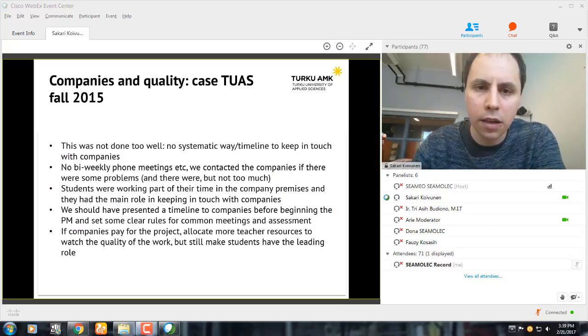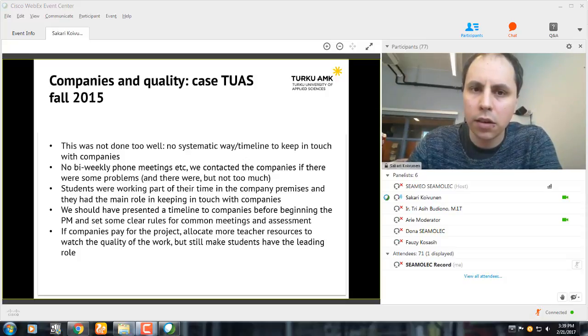Again, I'm referring to the case from 2015. We did not set too systematic a timeline to keep in touch with the companies, and we should have done this a little bit better. We called them every now and then, and we asked the students to keep in touch with the companies, but we should maybe have had bi-weekly phone meetings or some other way to keep track of all the companies. So if there were some problems, we were maybe not aware of them too well.